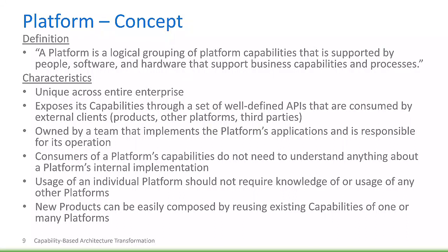And one of the ways that that could manifest itself in these types of circumstances is that if a particular platform team is asked to implement a new requirement, and particularly when there's funding associated with it, most people are not going to say no. That we really shouldn't do that. That's not my problem. It really should be related to a different platform where that requirement would be better addressed. So again, an opportunity for enterprise architecture to provide a broader perspective across the entire ecosystem to make sure that when these new requirements got identified, that they were directed towards the appropriate platform team.